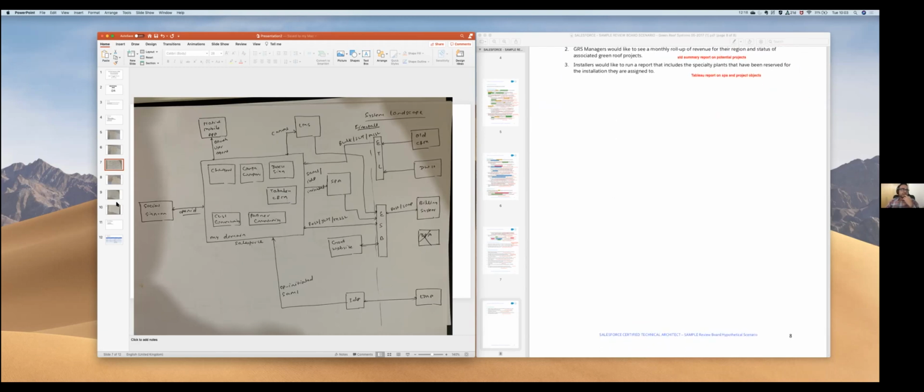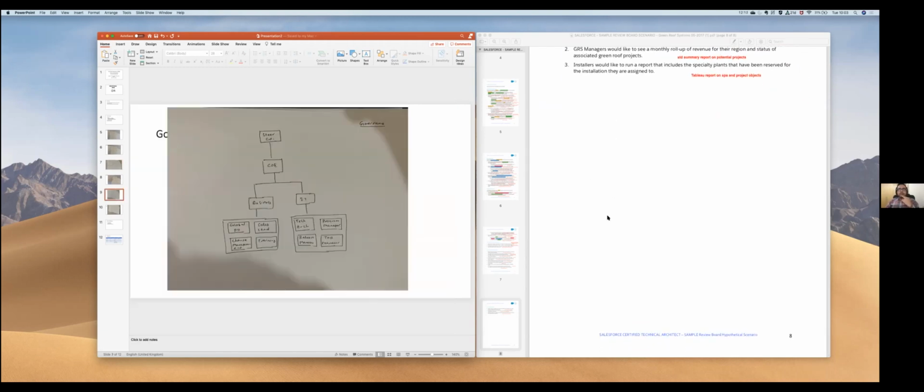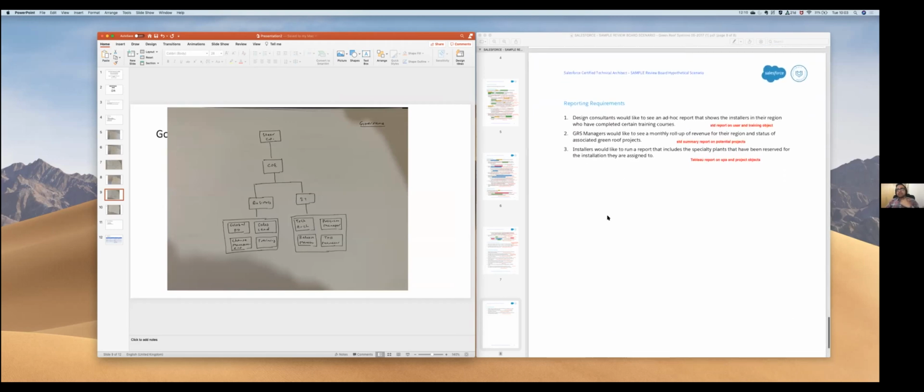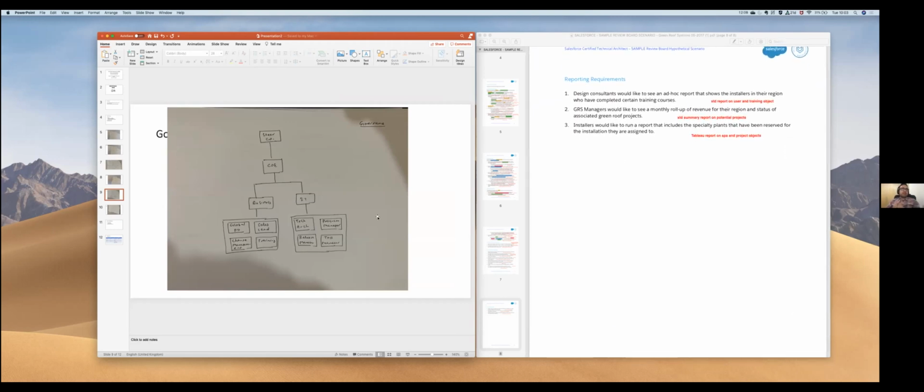There is no project lifecycle, but I have drawn something here. Because we have a number of different systems and a number of different integrations, we need to have some kind of governance in place to make the project successful. I'm proposing this governance structure here. We will have a steering committee on top, whose members would be taking decisions like setting the priorities, approving the budget, and all those different things. Under the steering committee, we will have the COE.